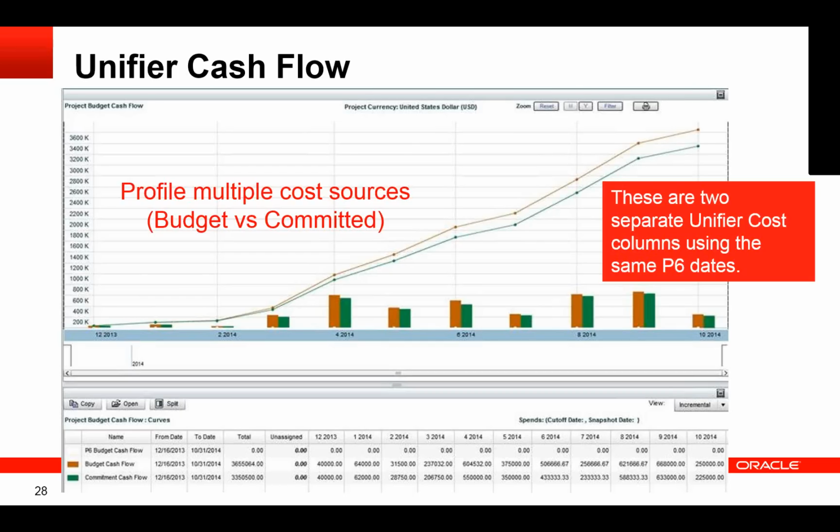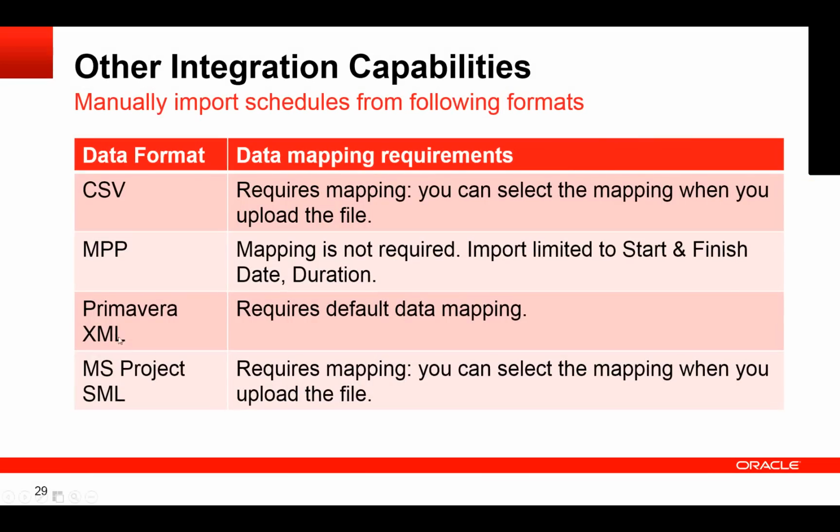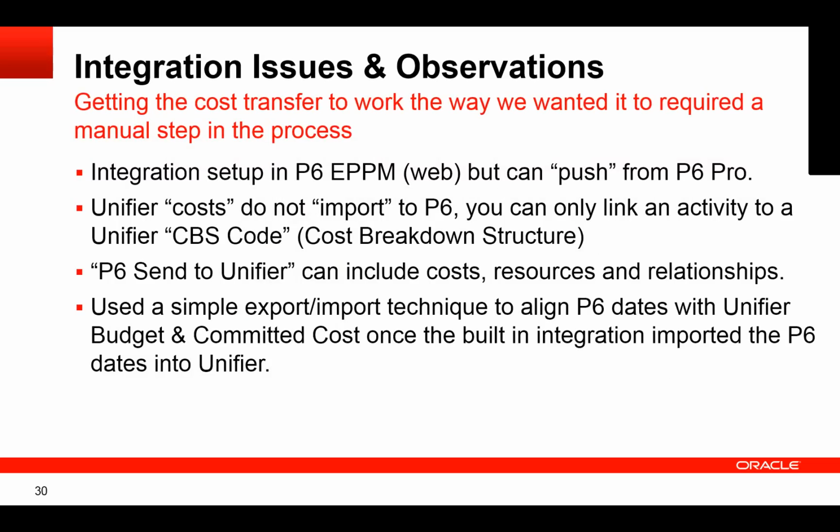This is the built-in. There's also other ways of doing integration with schedule using CSV files, which requires more manual data mapping. It also supports direct import of MPP files and XML files. So there are some other optional ways to go that would allow you to do other fields. May allow us to pull the dates directly into those specific cash flow profiles, but it would take some programming work to do that, and we wanted to stick with what was in the out-of-the-box profile on this particular presentation.